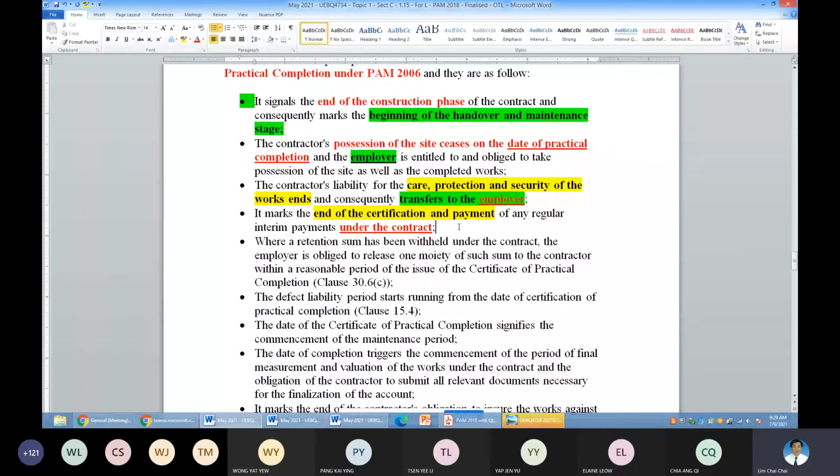It is up to the contractor, and also up to the architect to evaluate them and then prepare the certificate of payment. I did mention to you, as long as there is no certificate to pay, there is no proper mechanism for the employer to pay the contractor.